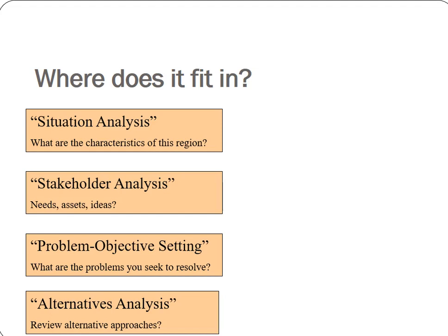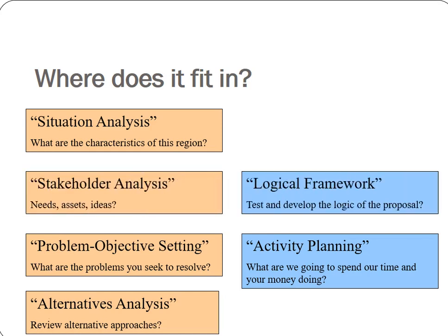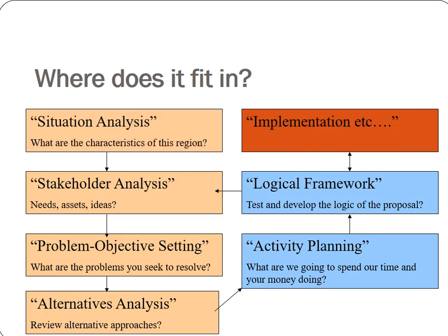You don't want to get locked into a linear way of thinking. Once you have a sense of what you're going to do, you need to plan what activities — and that's really when the logical framework comes in. You need to have done quite a lot of research and analysis before you start putting it together. At that point you go back to your stakeholders, having already talked to them about their needs, and start working with them again on putting together the logical framework. Once it's in place and hopefully you've secured funding, you can move on to the implementation phase.